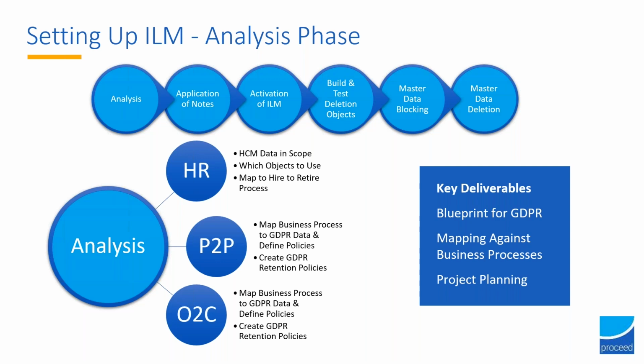Again, it seems like a really obvious thing to say, and it is an obvious thing to say, but I cannot reiterate enough the importance of good project planning for this type of project. We try to use an Activate type approach, so we're looking at the different phases, and we have quality gates between phases to see whether we're ready to go into the next phase. That's the approach I would absolutely recommend is implemented on this type of project: that you check you're ready to go into the next phase using that type of quality gate approach.